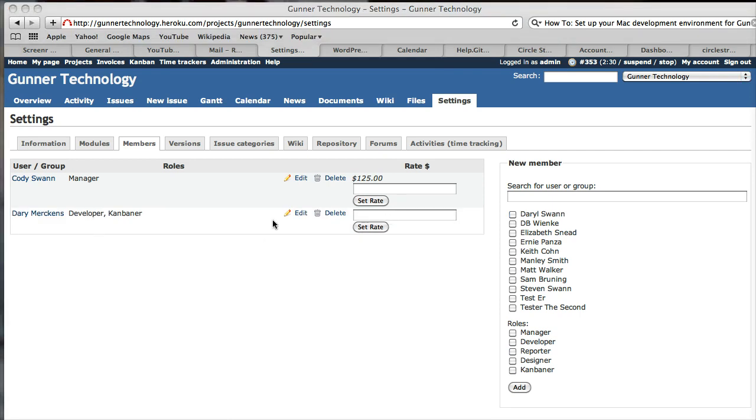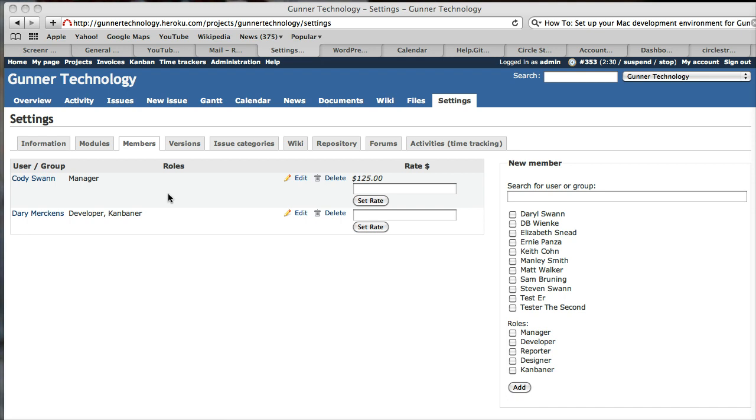Then it comes up and says it's done. Now, again, this is test data, so it doesn't really matter. But in here, you could set the person's hourly rate. For Gunner Technology, no one has a rate because it's for the company. But on a project-by-project basis, you can set their rate in here.